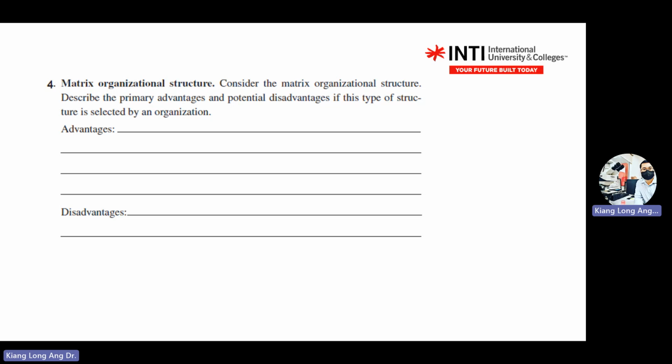Understand? In the traditional structure, there's no project manager position here. He is just suddenly appointed by the CEO and temporarily put inside here. You just coordinate and make sure the project is running, but the final decision is still with the functional manager in the traditional structure.